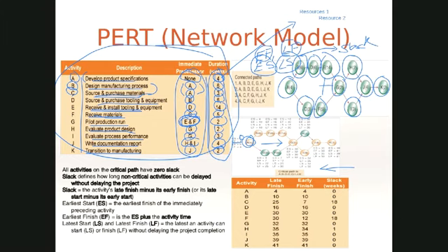So you can only begin A, week 0, and finish A, week 4. After A finishes, can you begin B and C? Now, activity A, or task A in this case, requires nothing as a predecessor, but B and C both require A to be completed.